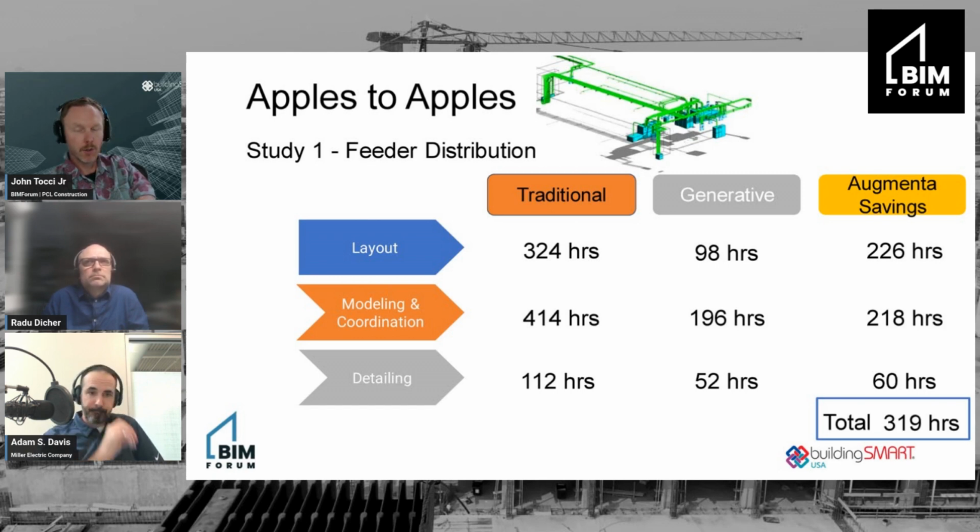And so 319 hours of non-critical work has a dollar value to it from a project value perspective, right? Like risk of liquidated damages and everything else. And 319 hours of LD critical path time is worth a whole lot more, right? Yeah, I would agree.